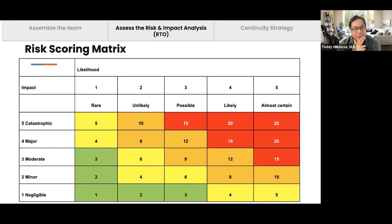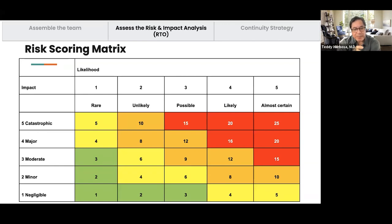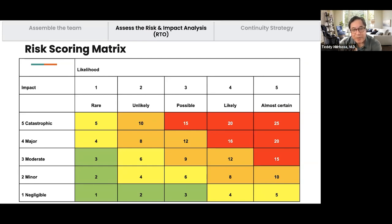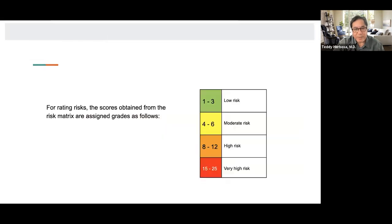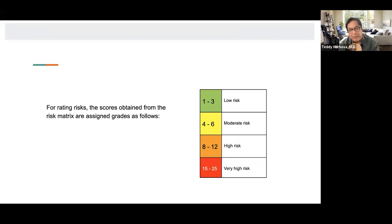The pandemic had a major effect on our institution, but its likelihood was rare — the last pandemic was 100 years ago in 1918. So it's something you wouldn't have planned for very well. However, now that we've learned from this pandemic, the next pandemic becomes a higher-probability category. You use points in the matrix to classify risk: a score of one to three is low risk, four to six is moderate risk, and so on.